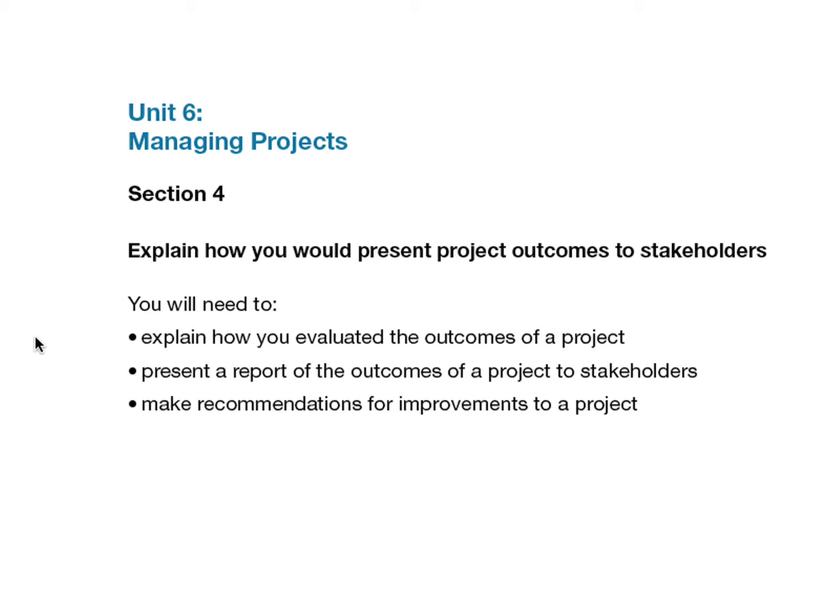Section 4. Evaluating the outcomes, financial, operational and stakeholder satisfaction outcomes, means applying review and evaluation techniques as the final stage in the closure phase. Here you'll need to create a simple report in business report format designed to inform a range of diverse stakeholders, which could include client, suppliers and contractors, employees, perhaps local authority and local community and the local and national media, of the outcomes which are relevant to them rather than the outcomes that are relevant to the project delivery organisation itself. Finally, recommendations for improvement are natural outcomes of the review and evaluation process.